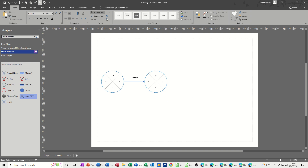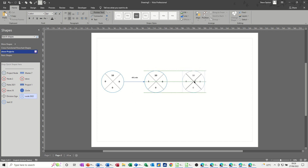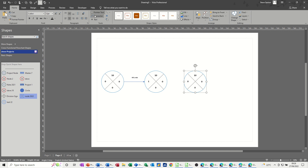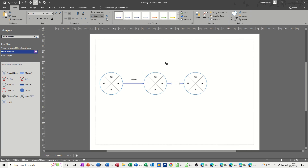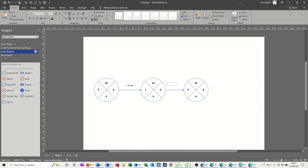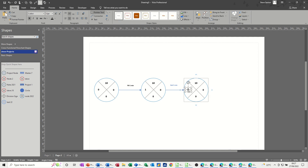Now I need to do another node, which is going to be boil the kettle. This is going to be Boil. I'll put the connector tool on and snap it in place. I'll add a text box above the line — just going to say boil five minutes. Now while that's happening, that's one plus five, so this node needs to be a six — so that's taken six minutes so far. I'll change the font on this later on.